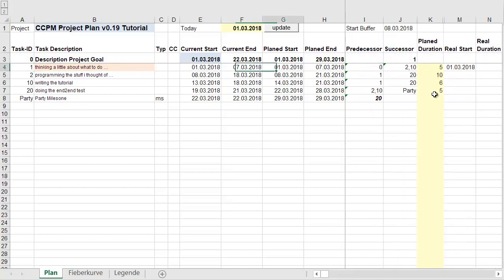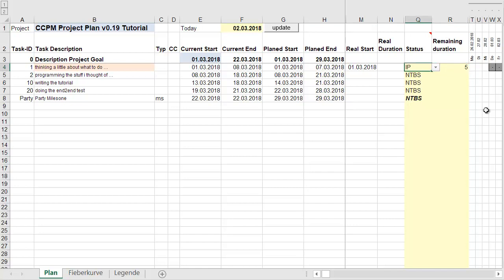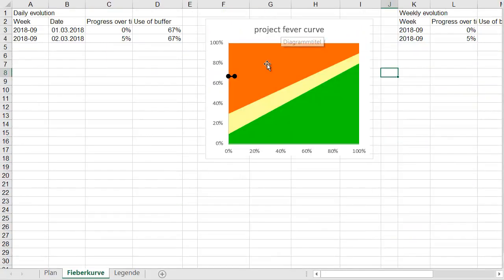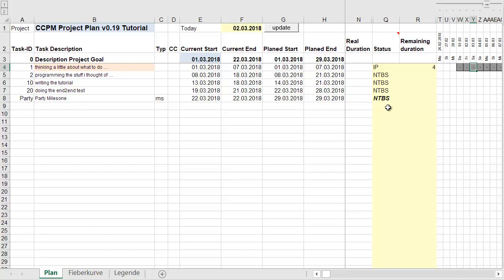That's day one — plan is done, thinking has started. On day two, I reassess remaining durations for all in-progress work packages. Nothing unusual: one day is gone, so I reduce the thinking time by one day and update. We've generated some progress, but buffer consumption is still high.